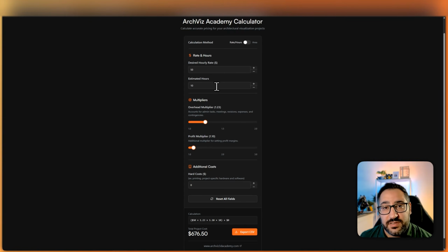So we talk about how long it's going to take. Let's say it's 10 hours, right? So most freelancers would just be like, okay, yeah, that fee is $500. But the problem with that is you're never building in your overhead or profit. If someone, or even yourself, is doing the work and you're not getting paid extra for all the other stuff like meetings or revisions or expenses, contingencies, software, hardware, who's paying for that?